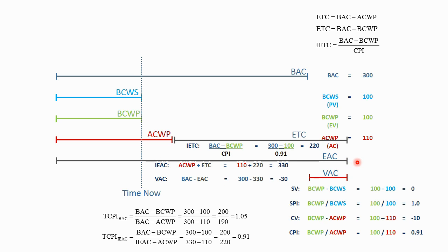So this may be more realistic. If 0.91 is the best the project manager can do, you surely don't want to tell them you've got to stay within the original budget remaining. That required a TCPI of 1.05. You may not want to tell them, I'll give you more budget, but it's just going to be the 200 hours that were in the original plan, and you've got to stay within that because that requires a CPI of 1.0. If the best they can do is 0.91, you want to take the performance remaining divided by their historical CPI and give them essentially an extra 30 hours of budget.